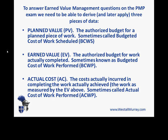And then thirdly, we need to know the Actual Costs. Those are the costs actually incurred in completing the work actually achieved — not the work scheduled, but the work actually achieved, in other words the work as measured by Earned Value. Sometimes this is referred to as the Actual Cost of Work Performed.